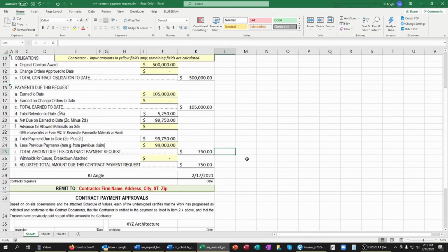Regardless of any amount of work that I did in addition to this, after I apply that amount of material to my schedule of values and then here onto my payment certificate or pay application, because I have to also reduce the amount of payments already processed or made, it's only going to offset the fact that I've already billed for that material and now I get the extra 5% of retention that would have been due otherwise for that.